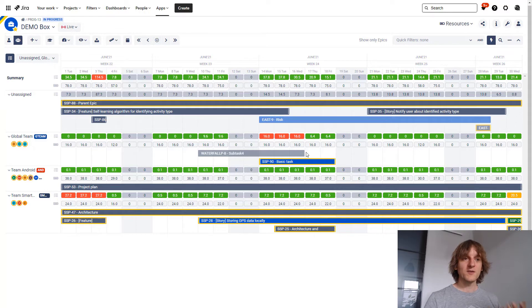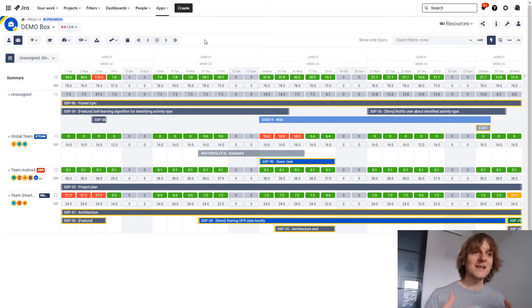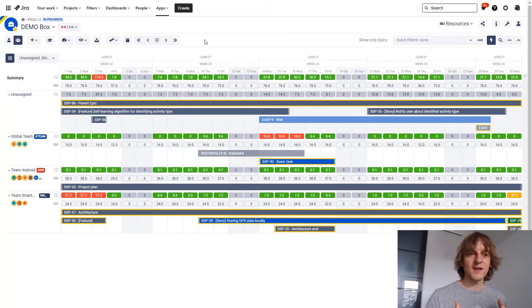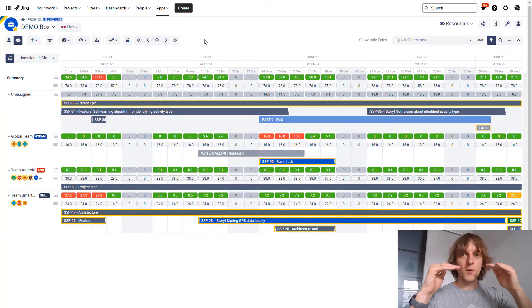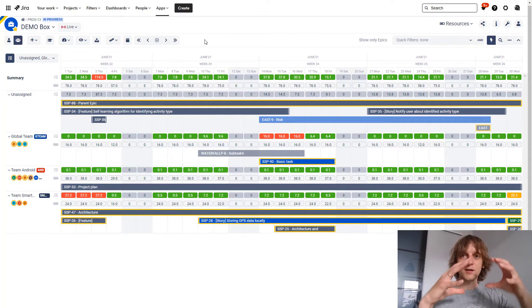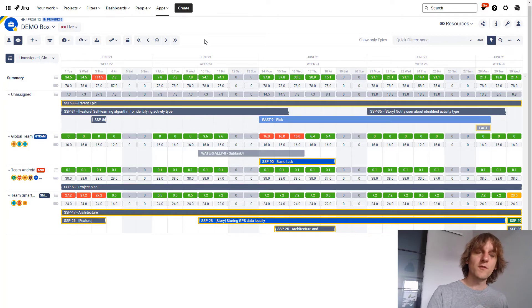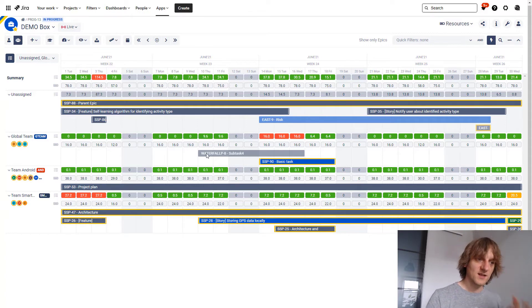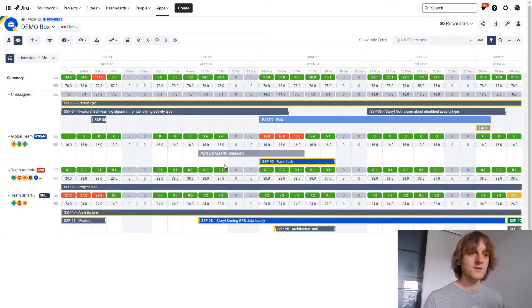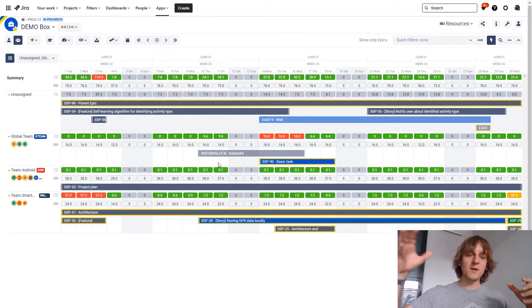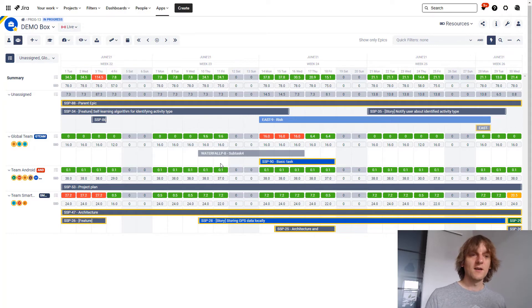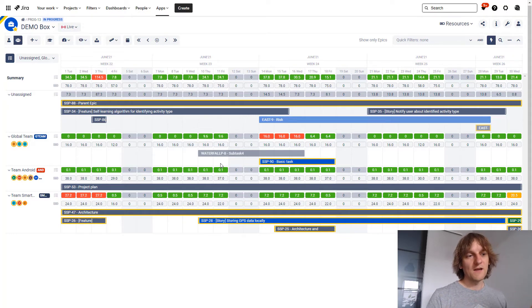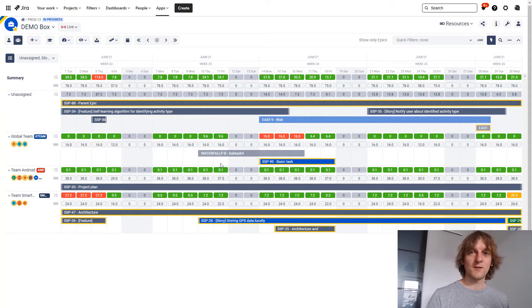So this is what BigPicture Enterprise can give you. This tiny little button over here, but hugely valuable. Is there a workaround? Yes, there kind of is. It's less easy to use, but you can always create a huge box on top of your box structure that encapsulates everything else. You can put there all the scope of all the smaller boxes of all your projects, for example, and create kind of like a portfolio view and then come over here and you will be able to see the full aggregation. But then it, for example, will not be easily accessible to the project manager that is sitting in a smaller box in the project box, for example, over here. And he or she wants to check how the planning is doing. You will have to actually switch the big box over there. There is a lot of data. So it's going to be probably significantly slower than this box over here. So it is a little bit of a drag. It's still doable though. So if you're tight on money, I think that it's still doable without BigPicture Enterprise. But having said that, this is one of the coolest features of BigPicture Enterprise.